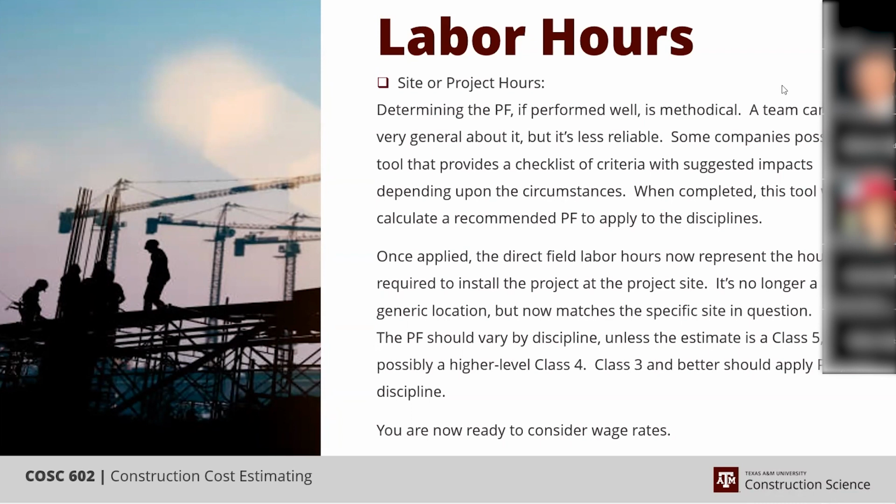1.45 to 1.75, it's pretty congested and you're working around a lot of live active plant systems and so forth, and it's impacting you because you have work permits and it's hot and so forth. And then if you have a lot of turnaround work, night shift, very dense, very congested, everybody's tired because they're working 75 to 84 hours a week, your productivities can get over a 2.